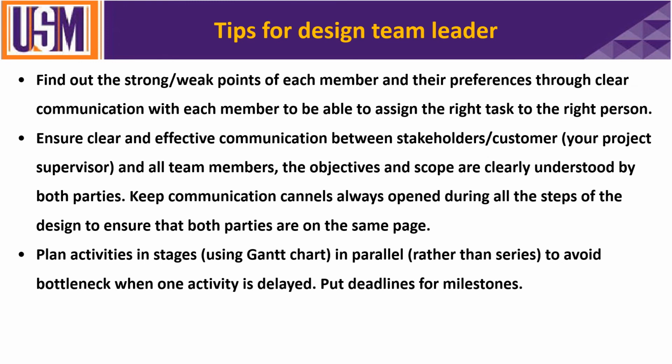The agile one is, rather than having steps in series, where one step finishes and another starts, you align most of the tasks in parallel. So if you need data from your friend, you wait for this data, but meanwhile you can start your process from other data, from literature. You start the calculation, a preliminary calculation. Then once you get the confirmation from your friend, you align with the results that you got and do some minor correction, but you already did the calculation. So you don't wait for your friend to finish before you start in series, but you start in parallel.